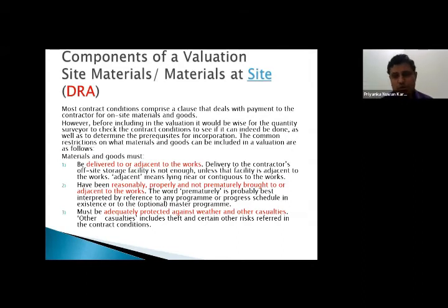That is one of the golden rules that you need to mention. When you have a site somewhere within the city limits, you cannot dump materials half a kilometer away from that and claim for materials at site. That is understood, right?